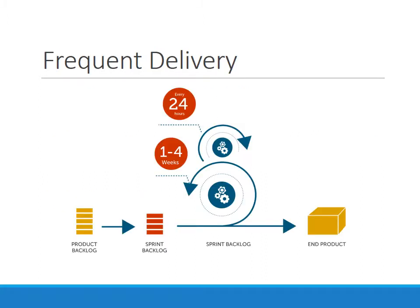Let's take a look at one aspect of what frequent delivery looks like. You have your product backlog, work's coming in, those things are getting refined, and then the team decides, based on priority, what it wants to do in the upcoming sprint, and so it builds out its sprint backlog. The sprint gets worked over a period of one to four weeks, and at the end of that sprint, you have working software. That in itself sounds like you're meeting the goal — you're delivering working software early and often because you're doing it every one to four weeks.